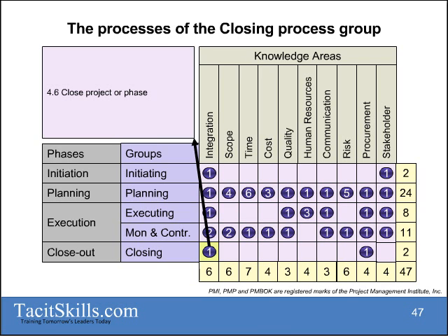And once we have closed the project, it means that we get final sign-off for the whole project, final reporting and the final sign-off. We have documented any lessons learned, and we are now completely finished with the project. And once that has happened, no project, no more. So we will see the start of our project is when we get our project charter approved under integration, under initiation, and the finalizing of the project is when we close our project or phase.